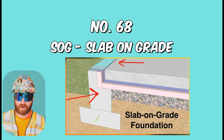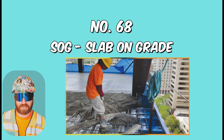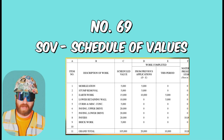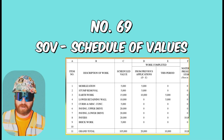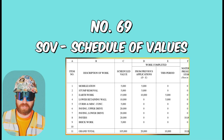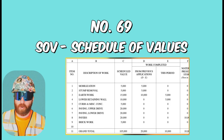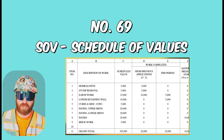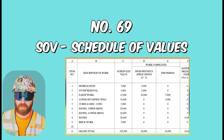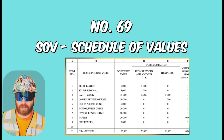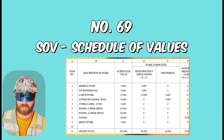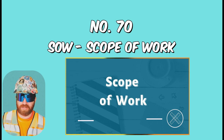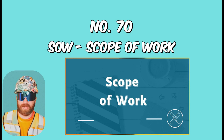SOG, or Slab on Grade, is when you pour concrete on the ground. SOD, Slab on Deck, is when you have an elevated pour. SOV, or Schedule of Values, is a breakup of the total contract amount into smaller sections — many construction projects are set up contractually to show transparency in pricing, so the owner can track what is actually being put in place each month. SOW, or Scope of Work — it's just the description of what needs to be completed.